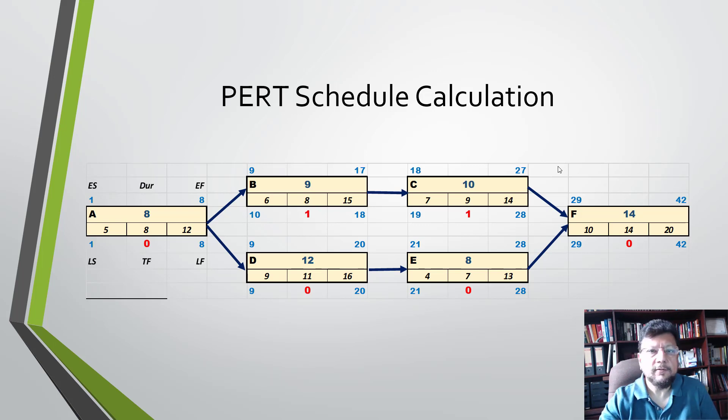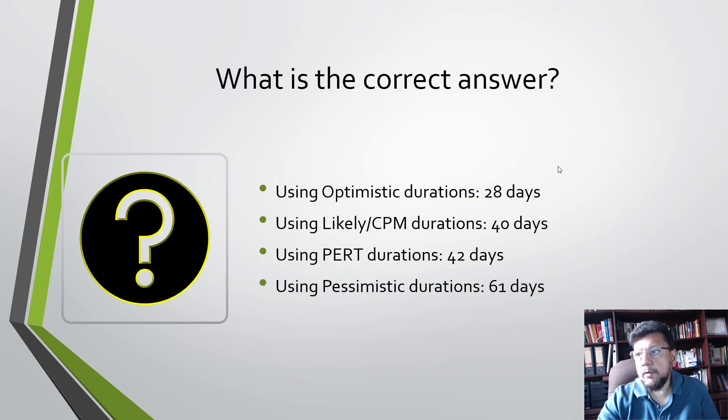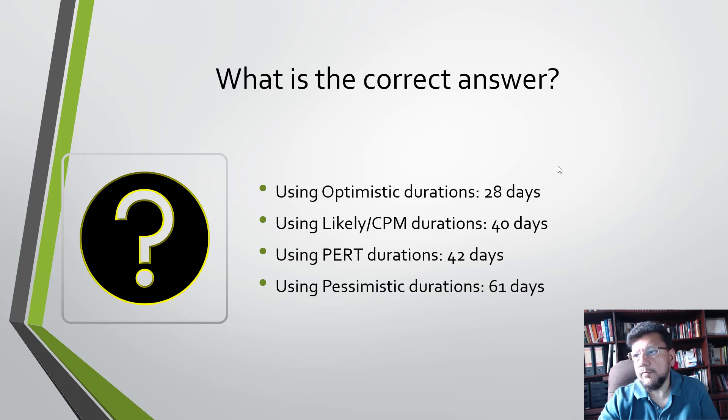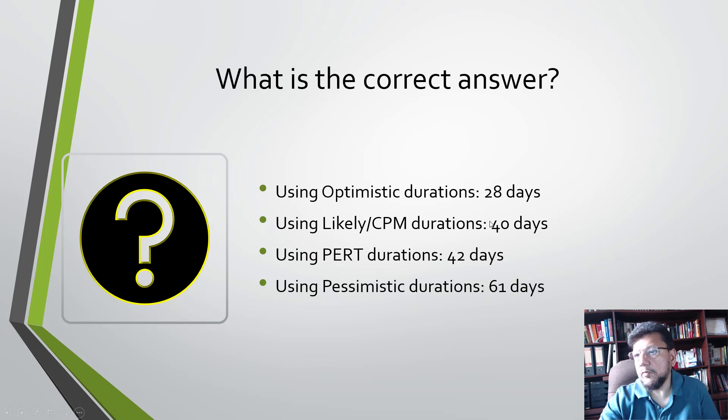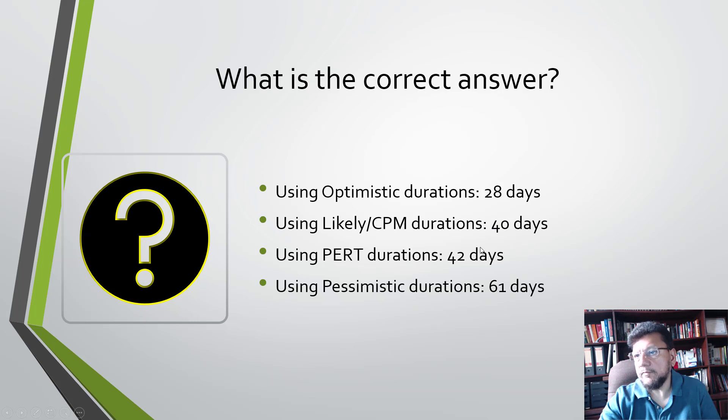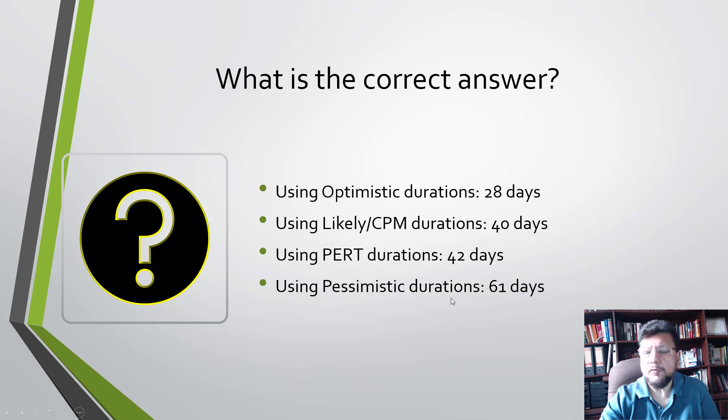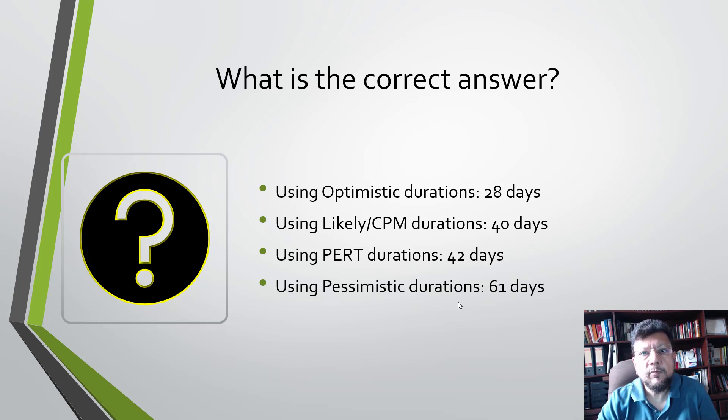Earlier we got 40 days with CPM. You could do other trials - if you pick all the optimistic durations you would get 28 days. If you use the likely, you get 40 days. If you use PERT, you get 42 days. And if you use pessimistic durations, you get 61 days. So the question is, which one is the correct answer?